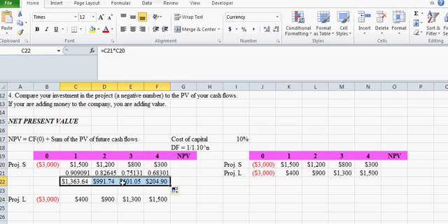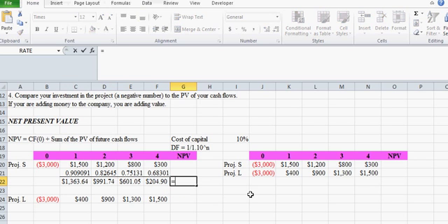And now these are the present value of the future cash flows. So we add together to get our net present value, the $3,000 in year 0 plus the sum of all of these. So our net present value equals cash flow in year 0 plus the sum of years 1 through 4. And our net present value is $166.33.